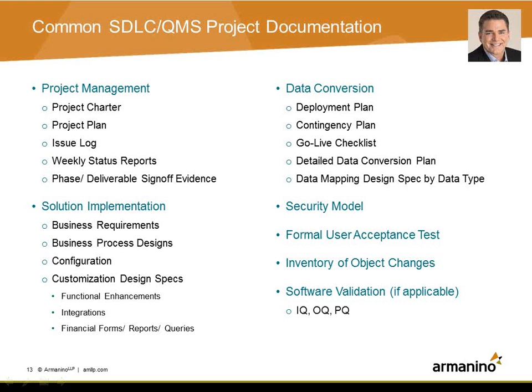And then data conversion, very important to the auditors, as Jeremy mentioned earlier, to be able to map the fields from your legacy system into the new system. And if there was a conversion, what actually changed by design, and documentation around that to prove it. They also want the confidence that we have a well-defined plan and a timeline as to how things are going to go, the go-live weekend events, and then the documentation around it that actually proves that things tie out.